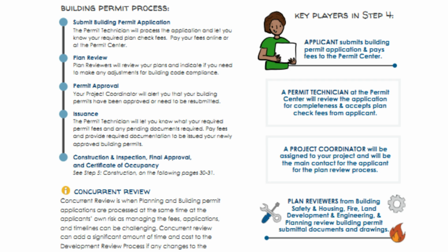The engineering department also coordinates with inspectors from Public Works to ensure that construction of any required public improvements goes according to plan. Following construction and inspection, inspectors verify that your project has been constructed in compliance with the approved plans and your building permits will be finalized. You will receive your certificate of occupancy and can now enjoy your finished project.